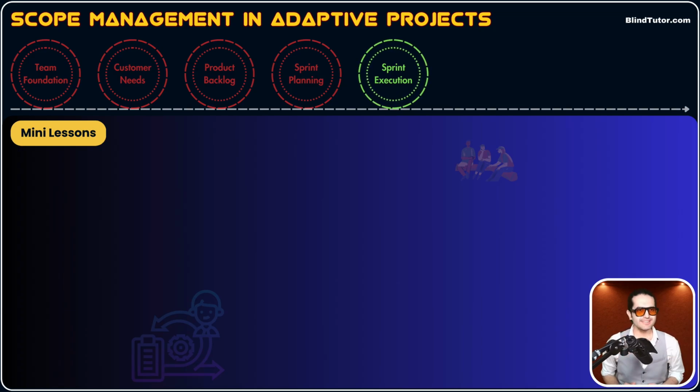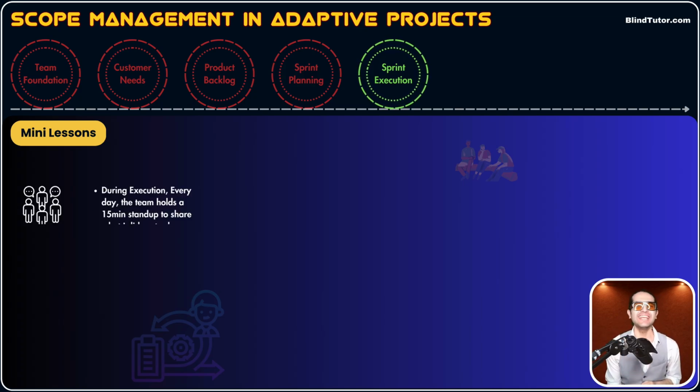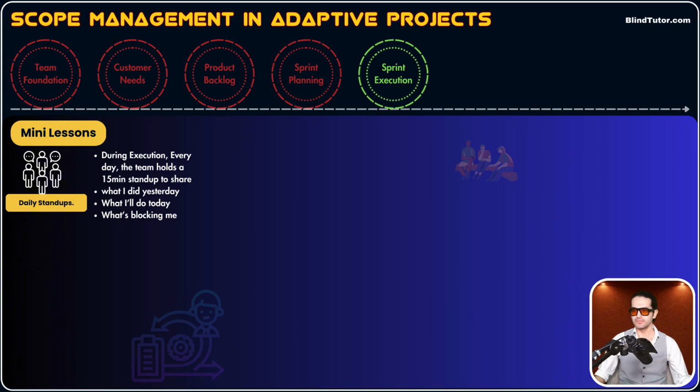Does the development team meet each other? Oh yeah, they meet a lot. They meet every day, every day for 15 minutes. And this ceremony, this meeting, is called Daily Stand-Ups. Guys, the development team stands up. I mean, they're not literally standing up, but it's a quick 15-minute meeting.